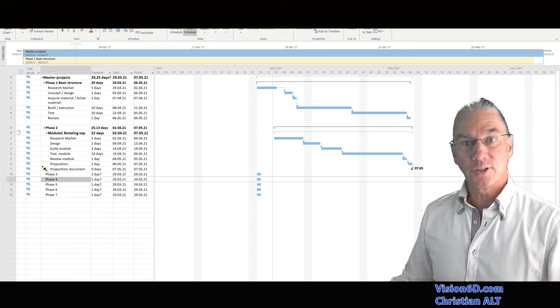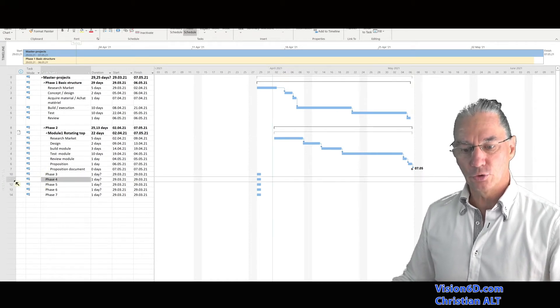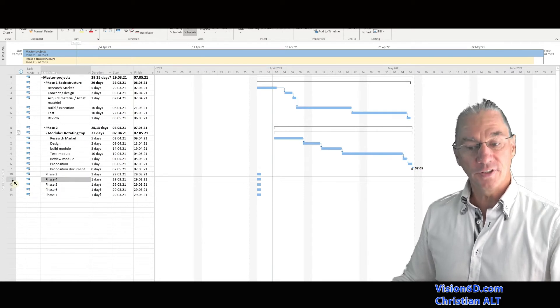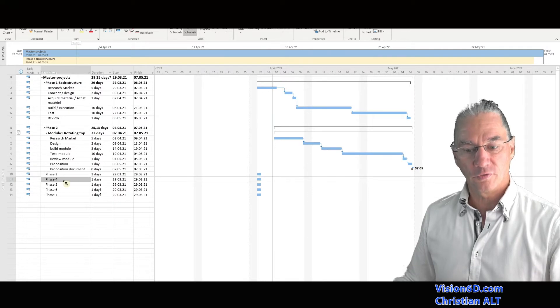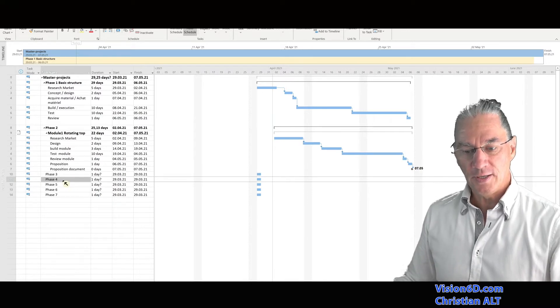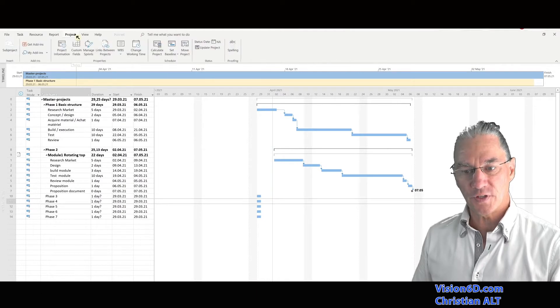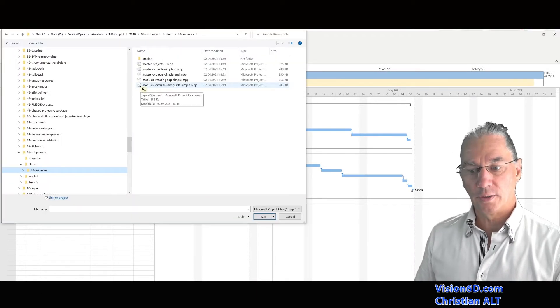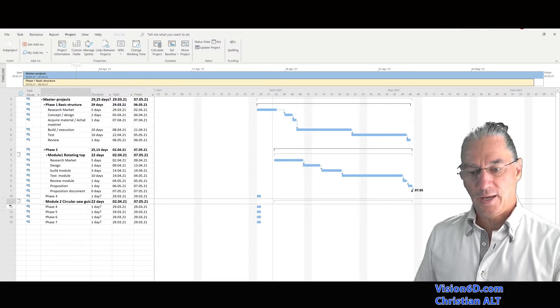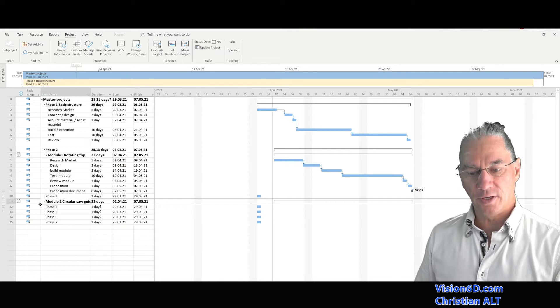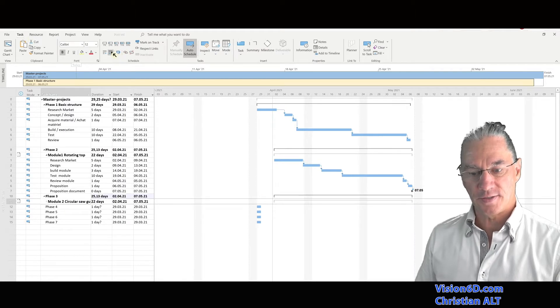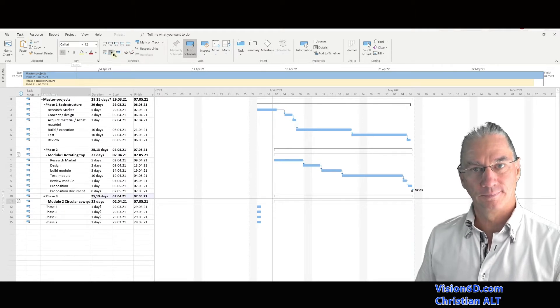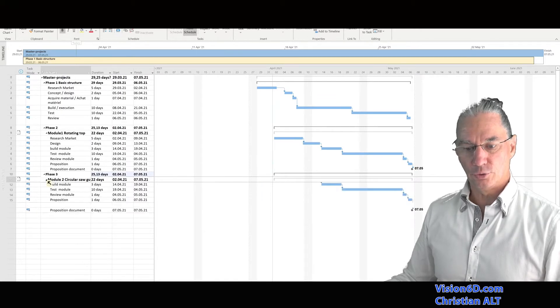I'm now going to insert the module two into phase three. For this, I positioned myself on phase four here. And I'm going back into project, sub-project. I can now pick module two. And we see that it positioned itself under phase three. And now what is left to me is to go into task and indent it so it really stands under phase three. We can also look at the content of module two.